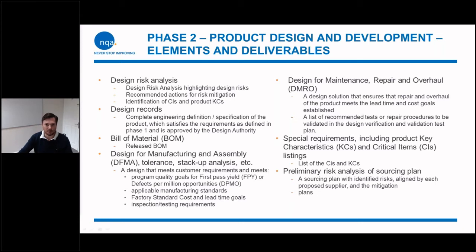Okay. Preliminary risk analysis of sourcing plan. That's quite a good one. Who the suppliers are, what's their qualifications as a supplier, have you gone to visit them? Do you need new suppliers, or can you utilise your current ones? If you've got current ones, you want to then start seeing, can they actually do the levels? Have they got enough resources to be able to fulfil your requirements? It's no good designing something, throwing it out there, and all your suppliers going, we can't make that. So it's asking you to do some front end of that. Just have a look at it, see where the risks are.